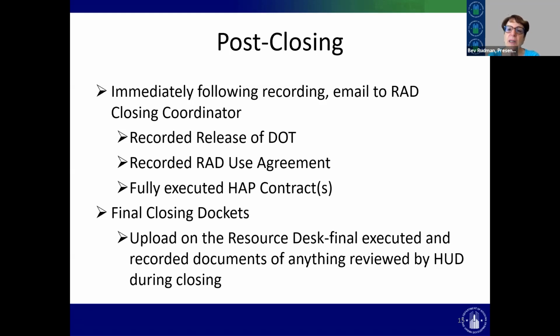Then after those three things are emailed to us, the rest of the documents that we are asking for as the final docket need to be uploaded onto the RAD resource desk. And again, what is the final docket? It's anything that you provided to HUD for review should be loaded in its final fully executed form. So it's not only documents that HUD signs, it's other documents that affect this transaction.